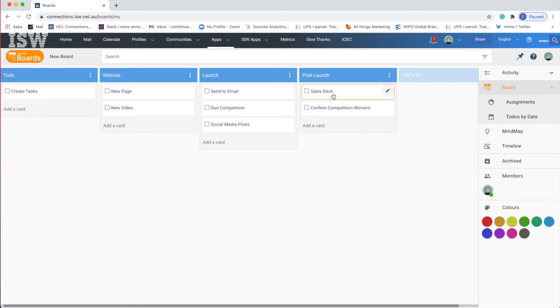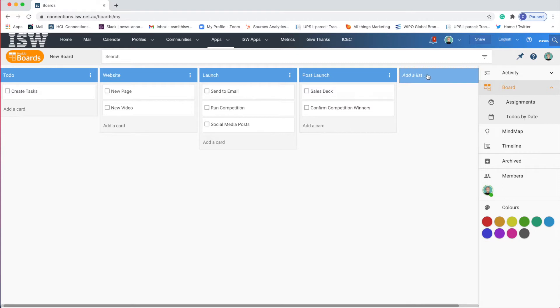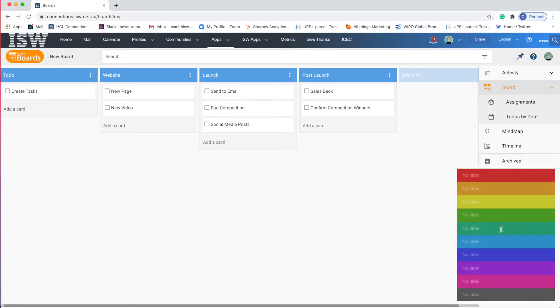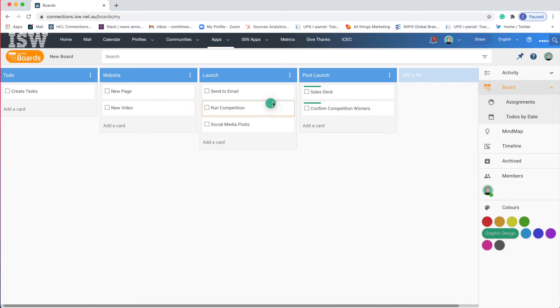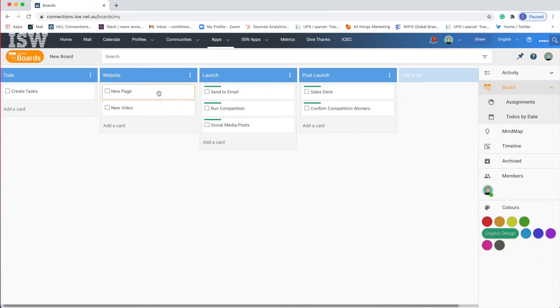Looking at this I'm thinking okay I need quite a few graphical elements for my emails, my page, my social media posts. They all need a graphic designer. Now I could add a list here called graphic designer but actually having website, launch, post-launch are very logical for me for this project. So another way of noting this is to add a color label. So I'm going to call this graphic design and apply this color to any tasks where I'm going to need help from a graphic designer.